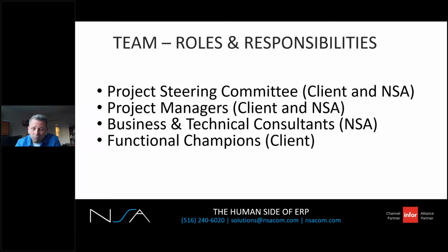So advice here, a good internal dedicated project manager is the key to keeping your project on task. Good project management won't avoid problems, but it gives you early warning that things are going off, because there's targets. When you miss targets, you see them early on, you have more time to react.